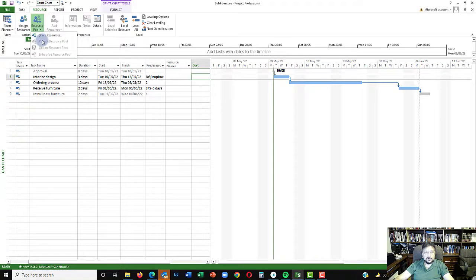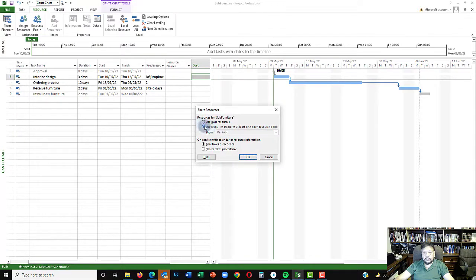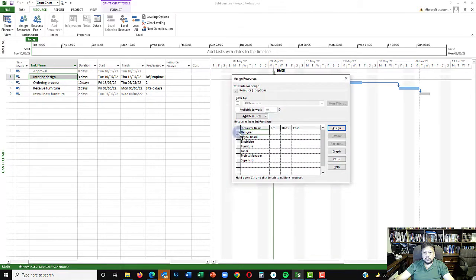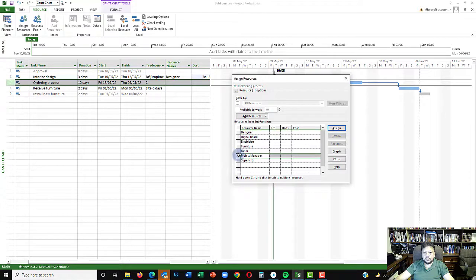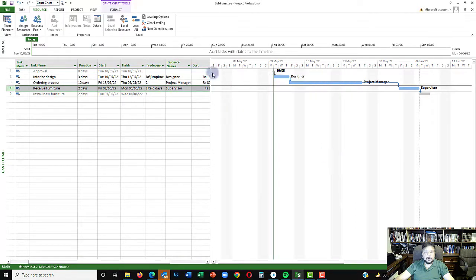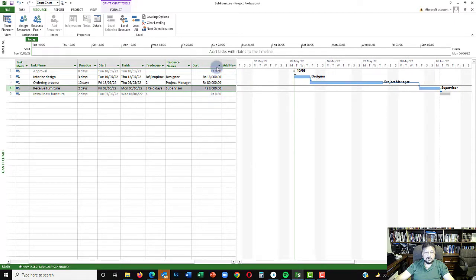Click on Resource Pool and then select Share Resources, choosing the resource pool file and clicking OK. Now we are connected to the resource pool. Let's assign resources: the designer is assigned to interior design, the project manager to ordering, and the supervisor to receive furniture. You can see costing is automatically calculated as soon as resources are assigned.